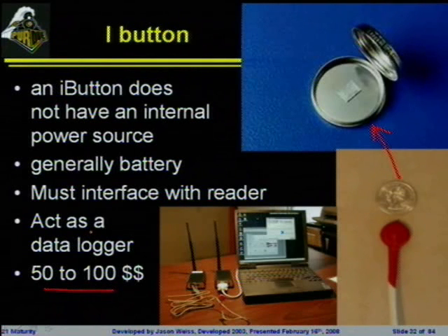And you may say, well, $50 doesn't sound like that much. If you are paving and you're dropping 5 or 6 or 7 of these in every single day, in the grand scheme of things, it may not be that much on a paving project. But if you're looking to try to be the low bidder and you're dropping 5 of these in at $100 a day, and you're doing that over the life of the project, it adds up very quickly, especially compared to the guy who might be using something that's hardwired at 17 cents. So it's a big difference and something you need to be aware of.